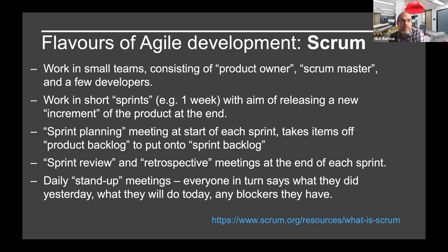And then in Scrum, all work is divided up into sprints, which could be a week or 2 weeks. And the aim is always that you release a new increment of your product, or whatever that is, at the end of each sprint. You also have a lot of fixed things within a sprint. So you have a sprint planning meeting at the start of each week or each 2 weeks.